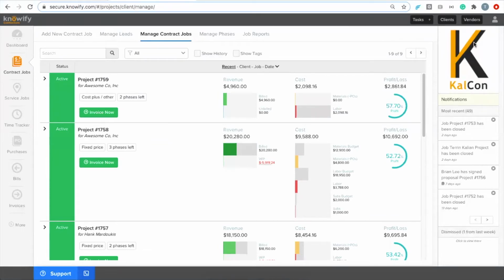And so that's a really big benefit of having that option, is that it keeps the process of tracking a subcontract a little bit simpler in Knowify, where I just tell Knowify ahead of time all of these expenses will be sub, and they react accordingly in my job costing. But another thing I'd like to note here is that once the vendor is marked as a subcontractor in Knowify, I don't need to manage this through bills any longer.